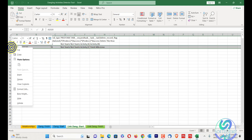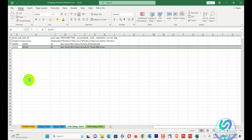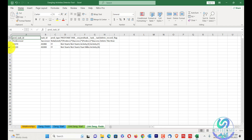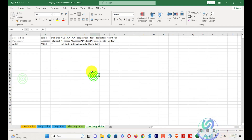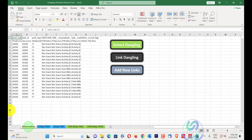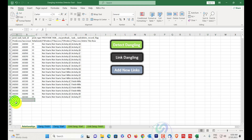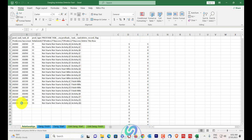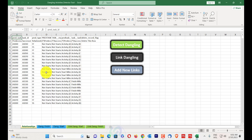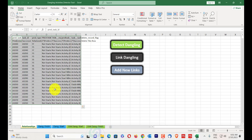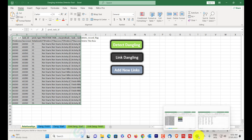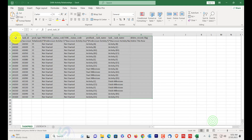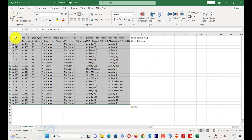The next step is 'Linking Dangling.' When you click on linking dangling, it will create new relationships. After a few moments, linking is finished. You can see new links have been created. Remove the finish milestone rows, as milestones have limited relationship types. You will see rows 21 and 22 are added with new links. Copy these new links and paste them into the exported relationships sheet.